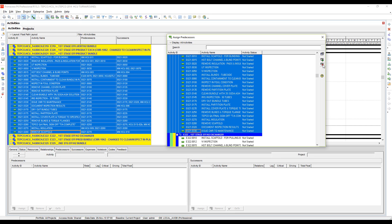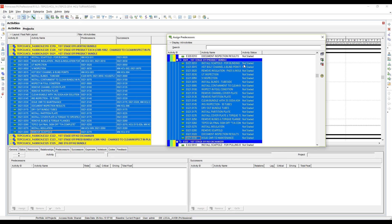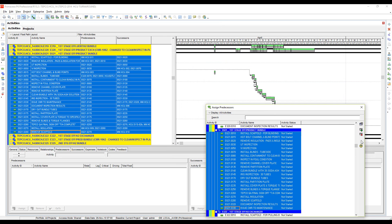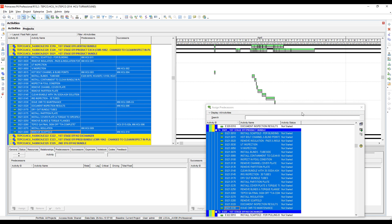Now if there are links going to milestones or to management summary milestones towards the top of the file, those would not necessarily be removed because I haven't highlighted them here yet, but this is one option to kind of get you started. You could hit delete on that and it should remove most of your relationships for that entire job, and there we go.